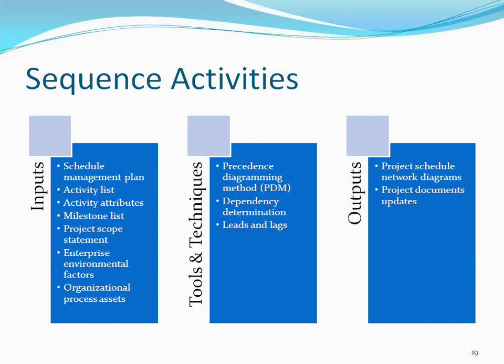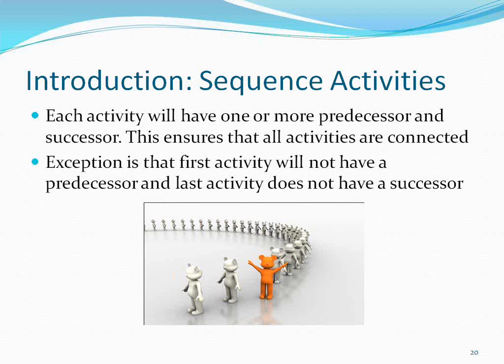For wall construction, you will mention 9 days. 10 plus 9, 19 days, you think you have prepared the schedule. But you have forgotten about the waiting time. Foundation may take 10 days for the construction, but after 10 days, another 10 days you have to wait for the foundation to set, to get dried. So that 10 days is also your project time.